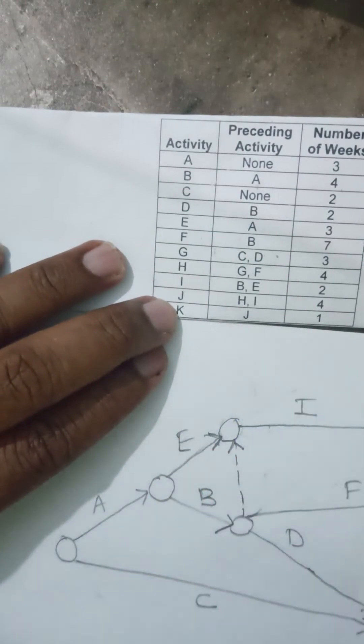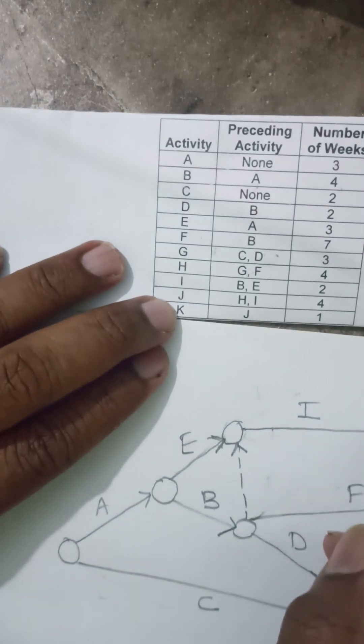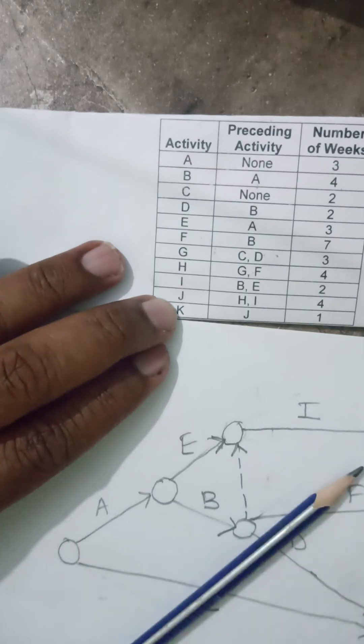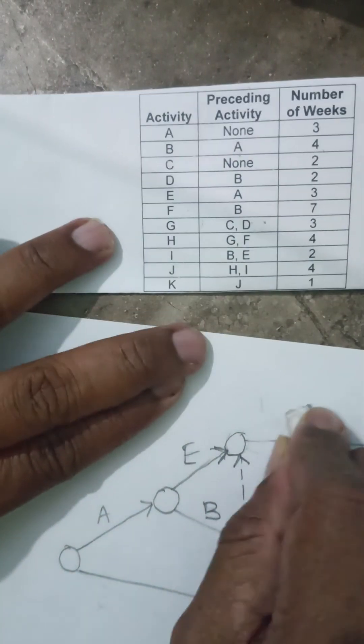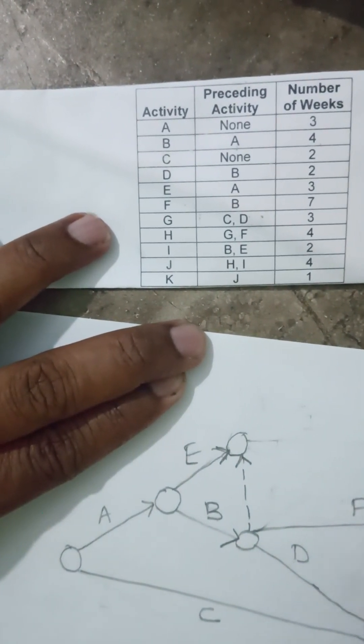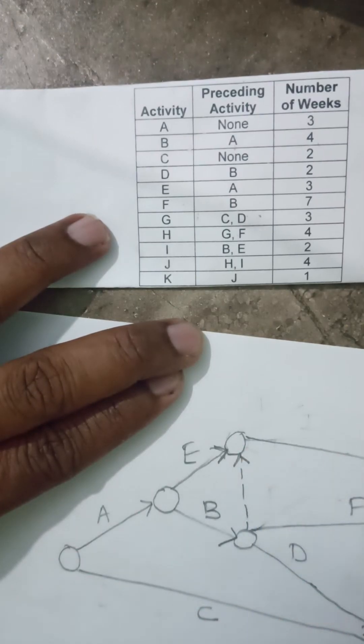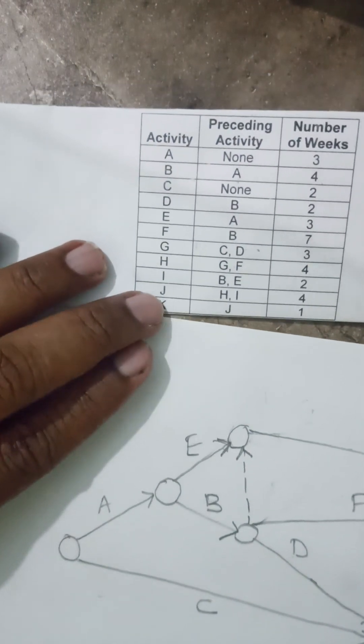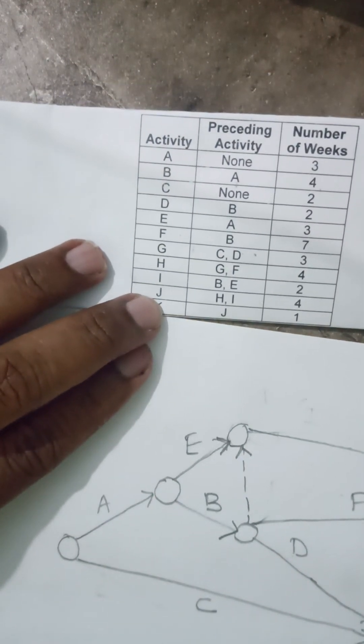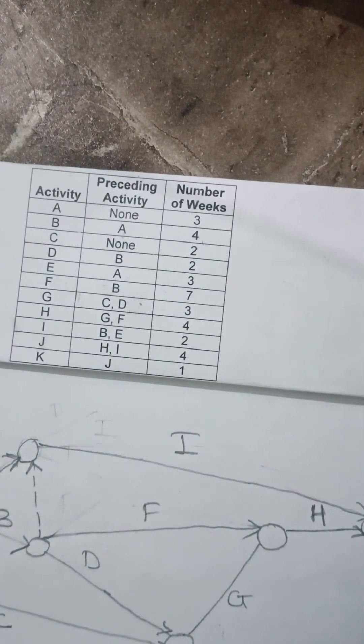J is from H and I. This H and I, I can again connect, maybe through a bend. But I will again, as far as possible, avoid bend. I will just use directly. This will be my I, and this is my H. And H and I gives rise to J. I am going to put J here.